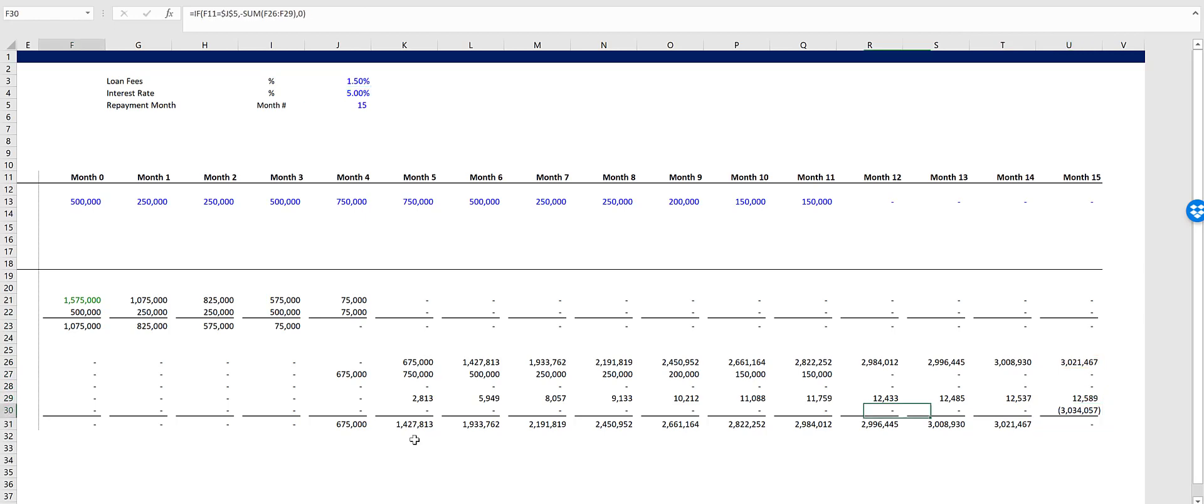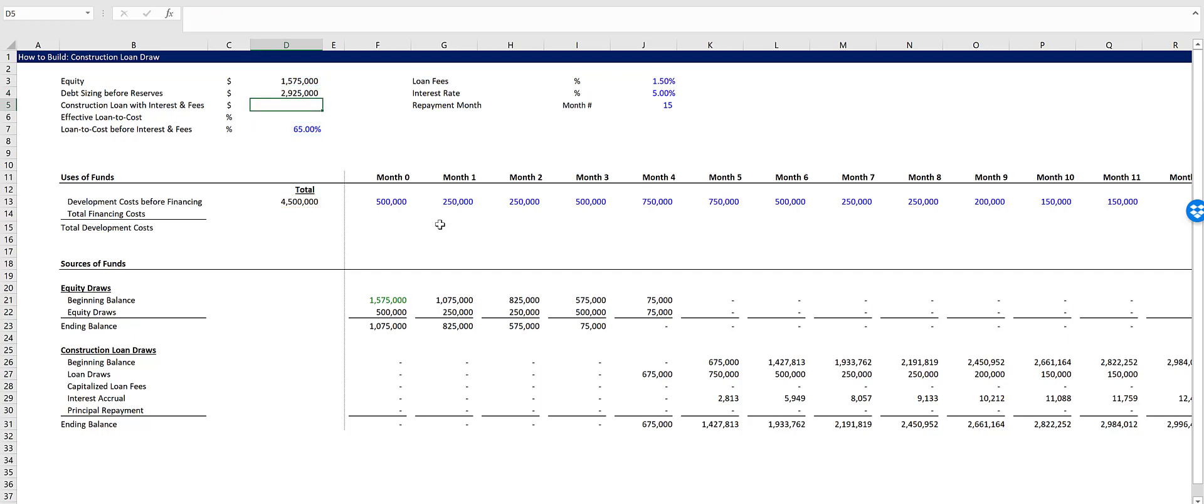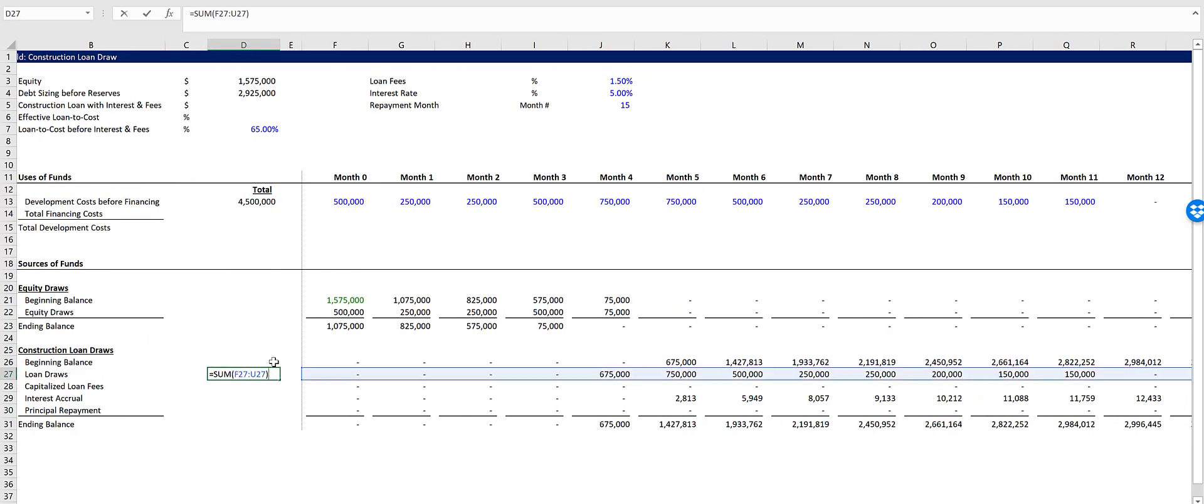And there's the payoff. So let's check this out. Our debt sizing before reserves would be 65% times the total development cost before financing, $2,925,000. Our loan draws, $2,925,000. Okay.